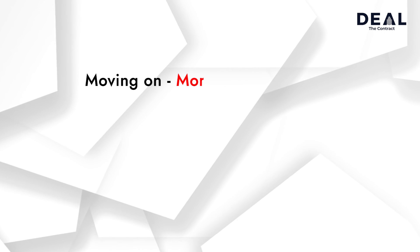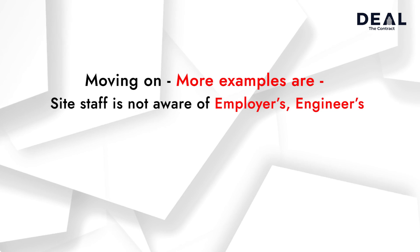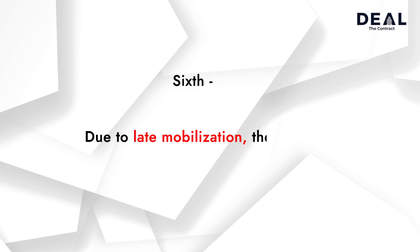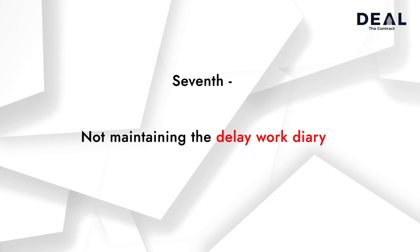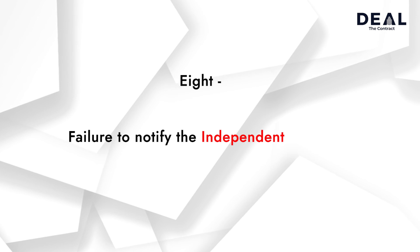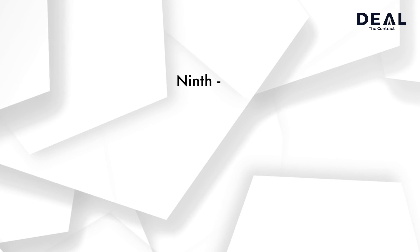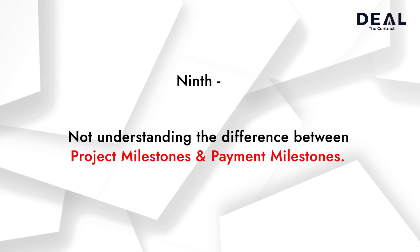More examples are: 5) site staff is not aware of employer's, engineer's, and contractor's duties to maintain good relationship with the client; 6) due to late mobilization by the contractor, there is a time and cost overrun attributable to the contractor; 7) not maintaining the delay work diary as a part of daily works diary; 8) failure to notify the independent engineer or authority engineer for change of scope or variations in time; 9) not understanding the difference between project milestones and payment milestones.